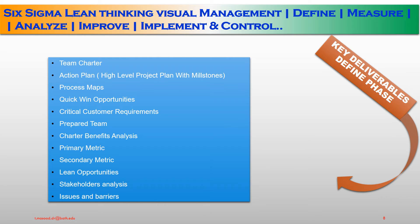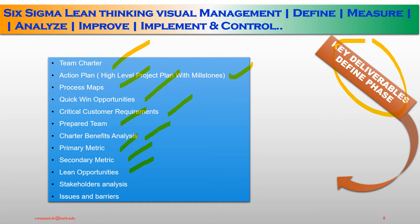Key deliverables for the Define phase: first, set up a team charter — the charter guidelines and barriers. Second, an action plan: a high-level project plan with milestones, process mapping, quick win opportunities, critical customer requirements, a prepared team, benefit analysis, primary metrics, secondary lean opportunities, stakeholder analysis, and issues and barriers. These are the deliverables we need to understand and validate in order to enter into the next phase.